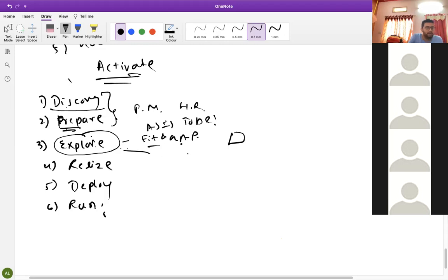We will download it and we will use it according to our business. No need to prepare any documents. Everything we have in the S4HANA server, so we will download from standard templates, and we will have a best practice for how we need to implement SAP. We will use all those things and tell them, this is what we are going to implement, this is your KDS document, this is your BPD document, give your approval.